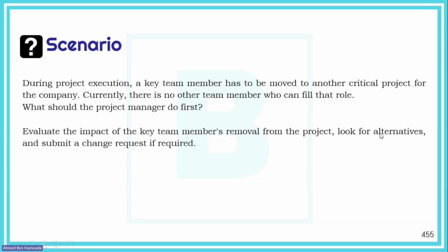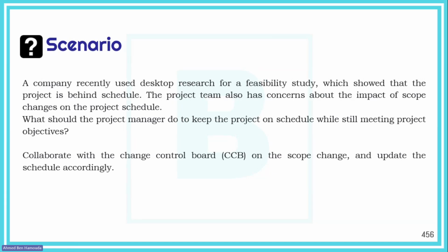Okay. I need to prepare my alternatives. And then, because I am in a weak matrix organization or in a functional organization, for this kind of change, I definitely need to submit a change request, okay? Because here I'm not in control, okay? Actually, it is the functional manager who is in control, okay? So I will have to go through a change request in order to replace this key team member, okay? So that's one of the scenarios where for replacing a team member, we will need to raise a change request. Okay, let's have another scenario.